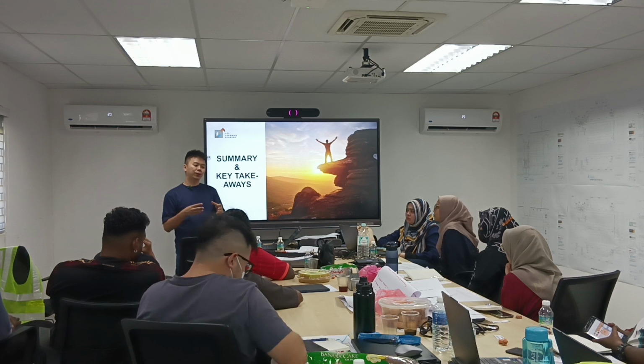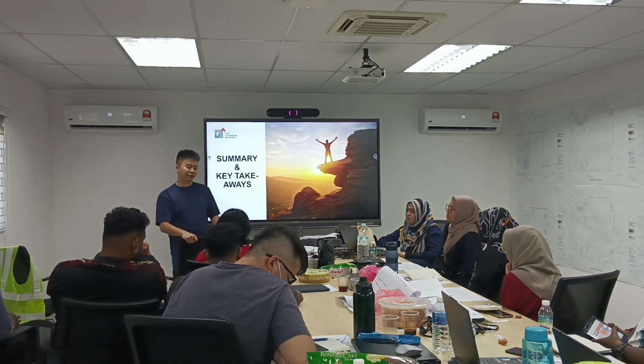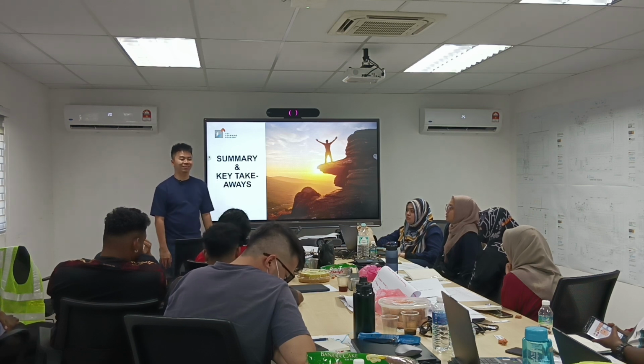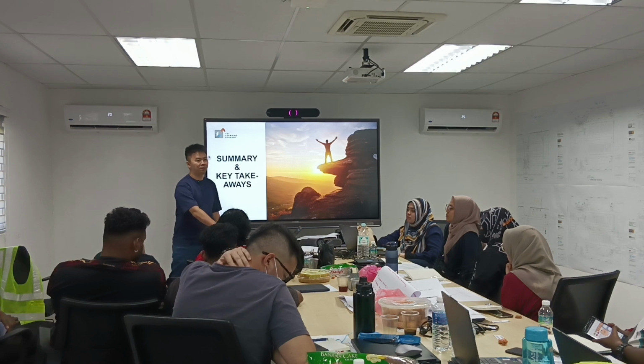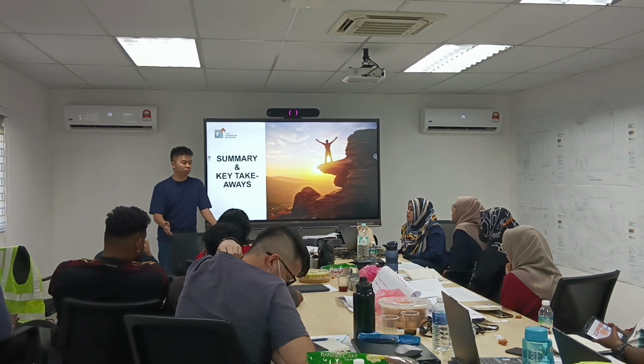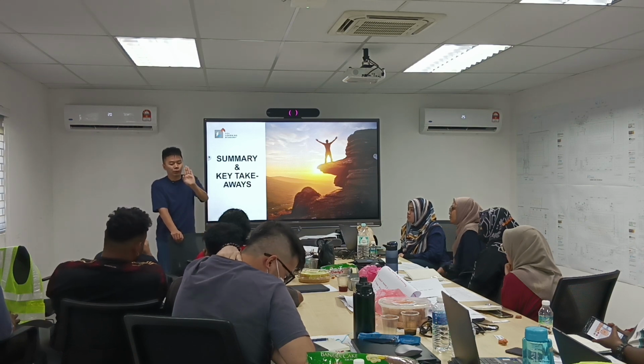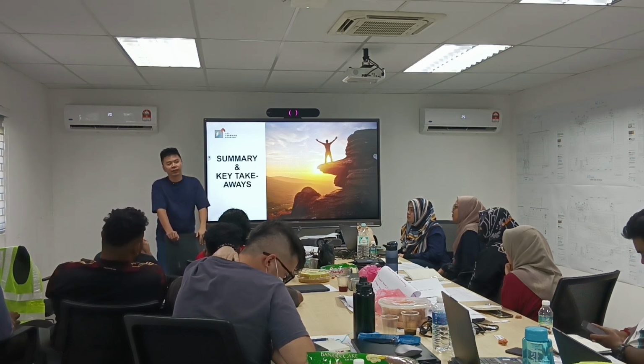Okay. So let's strengthen our documentation. We spell out general allowances and tolerances in our PQP and get the consultant to approve the PQP. It's not me, I just follow the PQP. You get me? If my PQP spells that I have 10% tolerance, so what? Why don't you want to sign? That you cannot spell tolerance in drawing, it doesn't make sense.